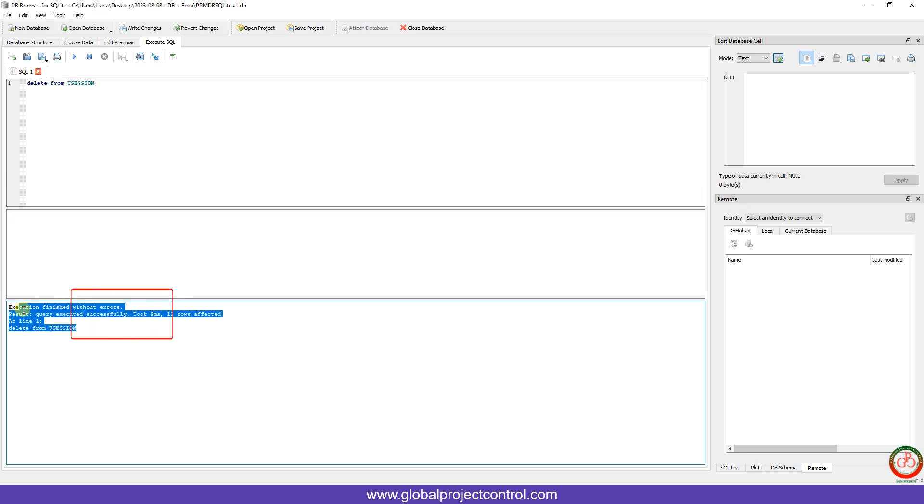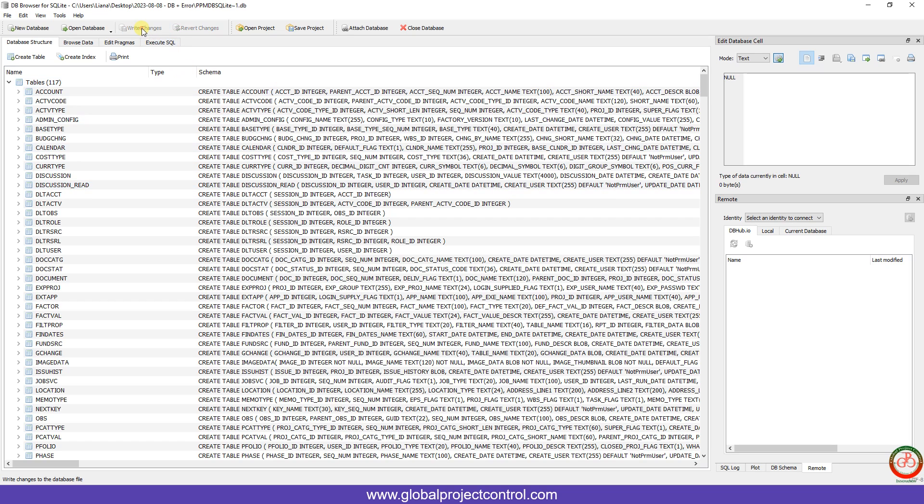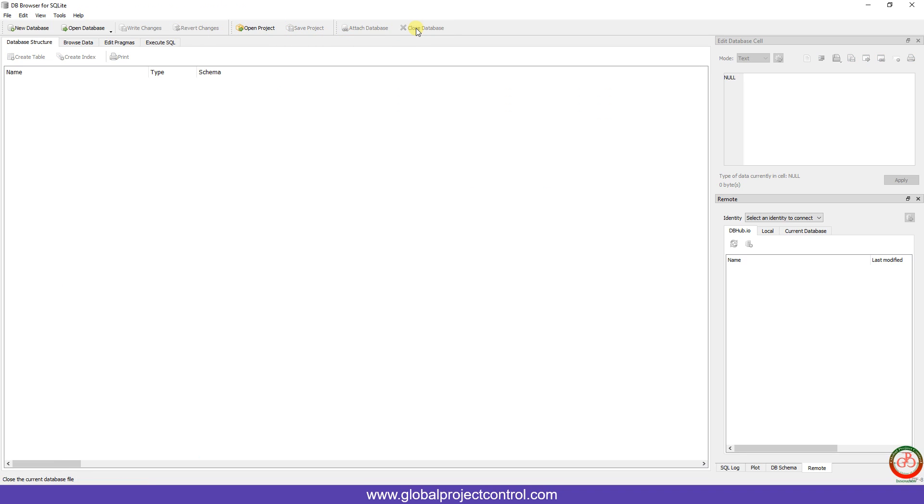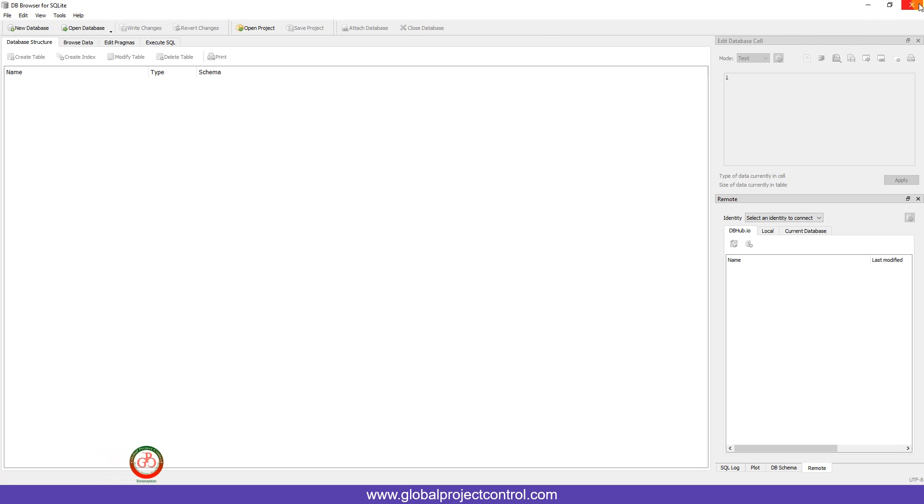This is the result. And now I should come back to the main table here, write changes on my database, close my database. That's it. Never open Primavera P6 when you open your database with third-party software like DB Browser for SQLite. Now I close it.